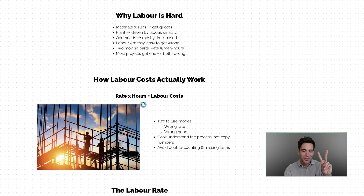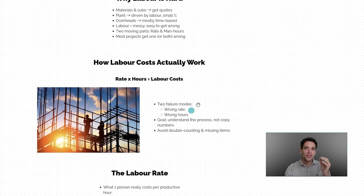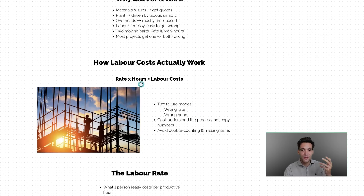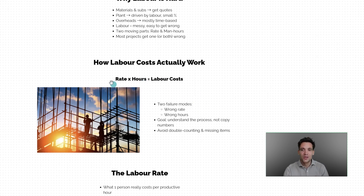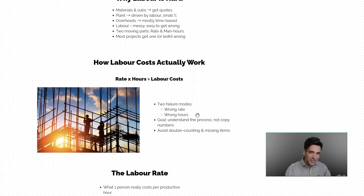Calculating labor costs is a combination of two key things: the labor cost rate you come up with, and the number of hours you need to budget for on your project, which gives you the total labor cost. There are two ways this can be wrong — really, you can either have the rate wrong or you can have the total hours wrong, with total hours being a combination of task activity and the quantity of work.